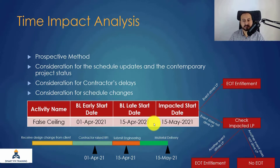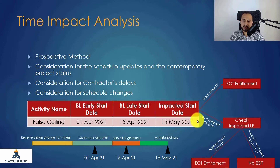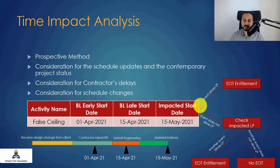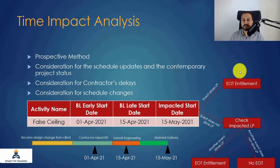For the schedule update, we have to check a logic loop. After inserting the event into the schedule update, we check the longest path. If this event is driving the longest path, there will be EOT entitlement.